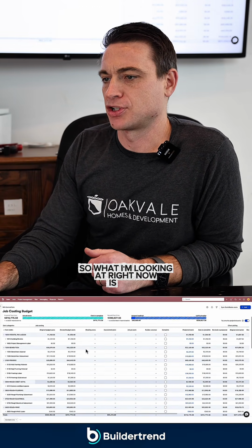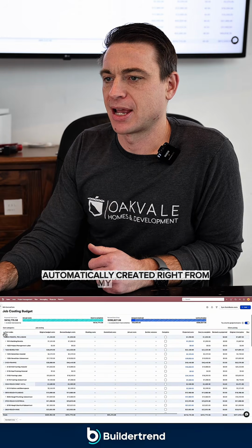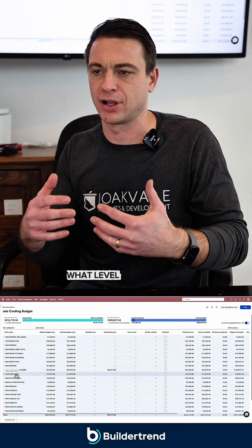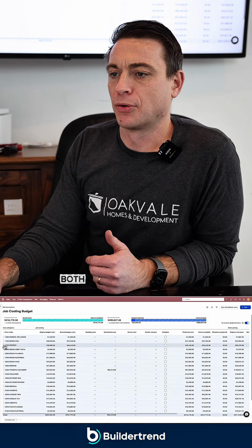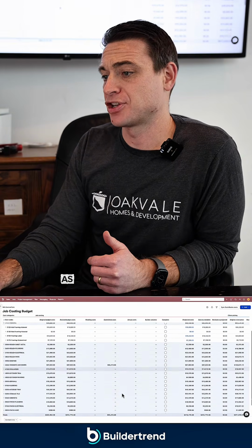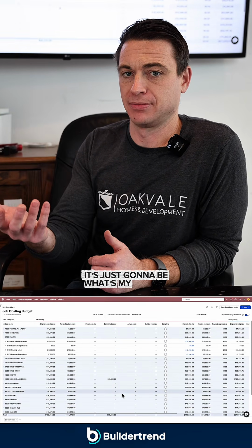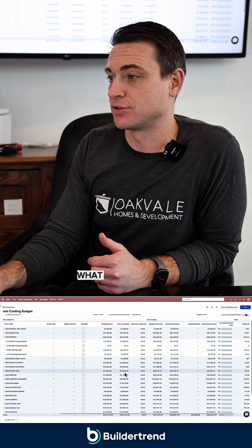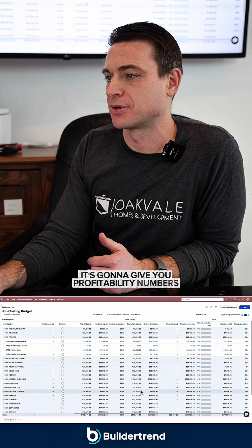So what I'm looking at right now is a job costing budget, automatically created right from my estimate. Again, you're going to see cost codes here. It's important that you think about your cost codes. What level of specificity do you need, both on the budgeting side? Here's my budget cost and the actuals, okay? As your budget starts out, it's just going to be, what's my budget? There's going to be no actuals against it. The system is going to assume you're going to spend what you say you're going to spend. It's going to give you profitability numbers, all of that.